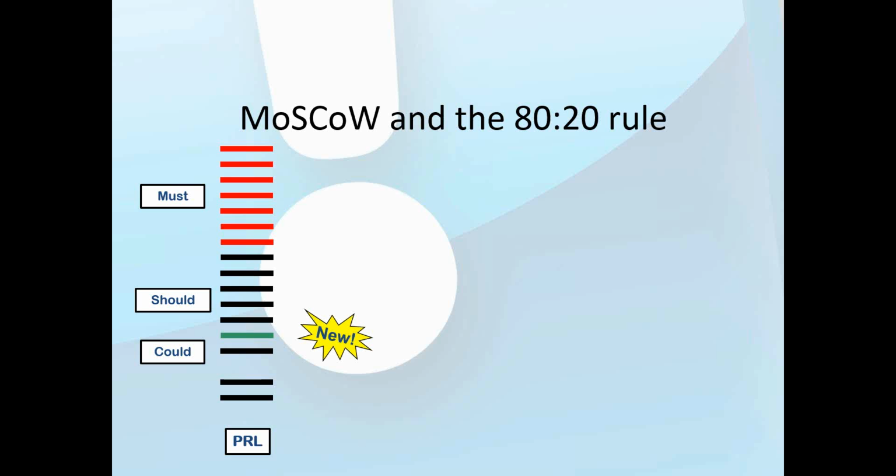Because working in a time-based way, in an Agile and DSDM way, quite simply, you can only get 6 months' work done in 6 months. So if you put another 10 days in because you've thought of something new, which is okay, something's got to come out. This is known as Archimedes' principle and the law of displacement.